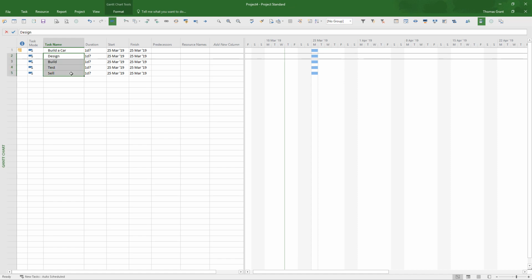Now the way we structure things in Microsoft Project is everything gets entered in initially as a task, and then we use the indenting buttons to structure the project. So we've indented the 4 WBS to the right so that they're now subservient to the title of the project.